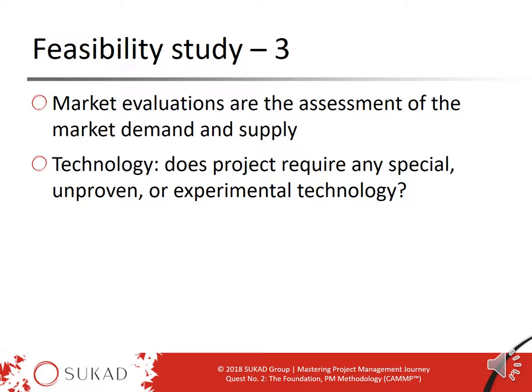Next is technology. This is not about standard tools like Microsoft Office — it's specifically about whether the project will use technology that hasn't been tested or is still in experimental stages. Standard off-the-shelf proven technology is no big deal. However, new unproven technology could mean higher potential bugs, a steeper learning curve, and more issues to resolve than usual. The response might be to use an alternative technology, or to include additional contingency allowances in your project estimate to cover for this potential threat.